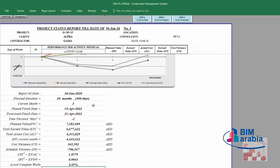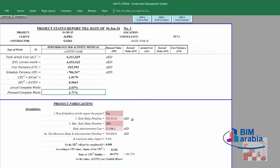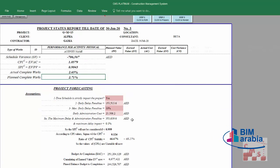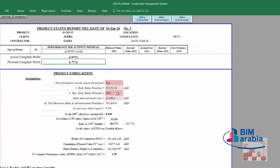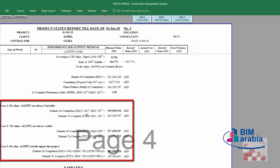CMS also provides a forecasting report, as we saw last month. The forecasting report shows how CMS calculates the daily delay penalty, administration cost, and maximum delay impact, and whether it considers the SPI. It gives calculations for the estimate at completion (EAC). There are three cases: when CPI is always unstable, when CPI is stable every month, and when considering the SPI. CMS gives three EAC values.